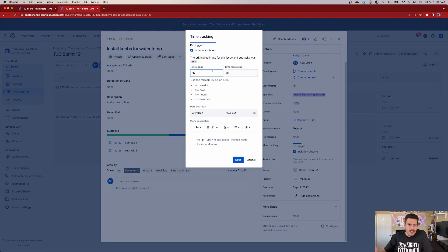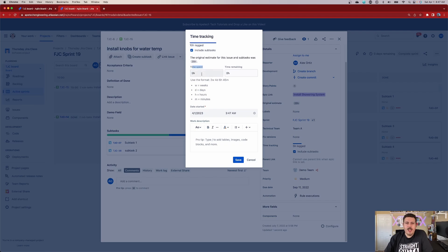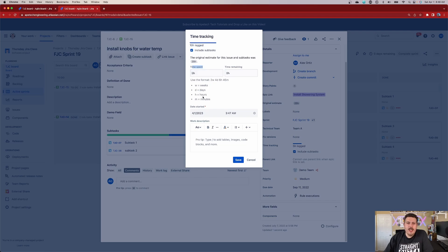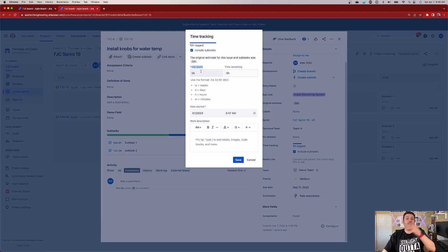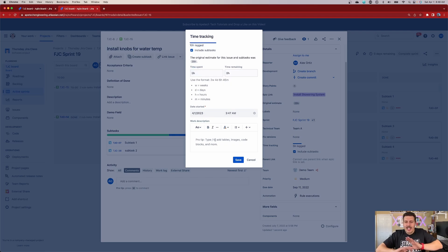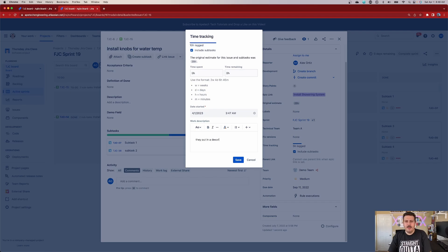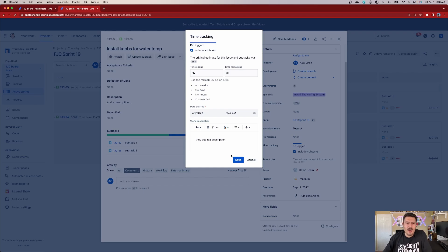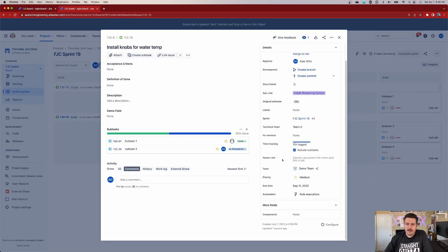This technique is going to work either way. So the main thing that I want to convey here though, is that when you come to time spent, your user, the person that's working on something is going to come in and say how many hours, minutes, days, or weeks they worked on a specific task. And so somebody can say, hey, I worked five hours today. Here's the date that it happened. Here's the time. And I always highly recommend they put in a description of the work completed just so that you have that for your logging efforts. And once you hit save, you'll notice that this 10 hours has automatically increased. I can click save here.